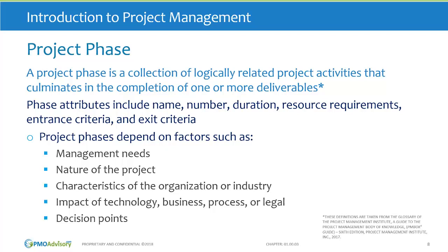Phases have attributes such as a descriptive name. You would want to know the total number of phases in the project, and for each phase, understand its duration, its resource requirements, and both entrance criteria as well as exit criteria. The definition of the phases will depend on factors such as the nature of the project, management needs, that means management within the project itself, as well as procedures and best practices within the organization.